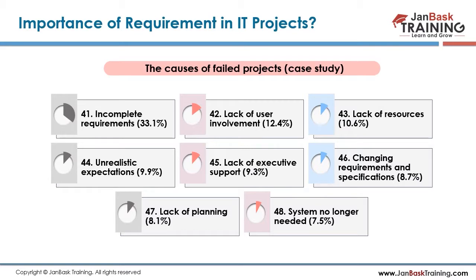Moving from waterfall to agile is one of the important reasons, because earlier we created 100-page docs and sent everything across for the client to review. He usually doesn't review it; he just looks at the important sections and gives a sign off. Later we end up in conflicts. I created this doc of 100 pages, sent it to the client, and the client gave me a sign off. That means everything written in the document he agreed upon, but that is actually not the case. The client has not gone into a deep dive of the information, and then we ended up in conflicts.